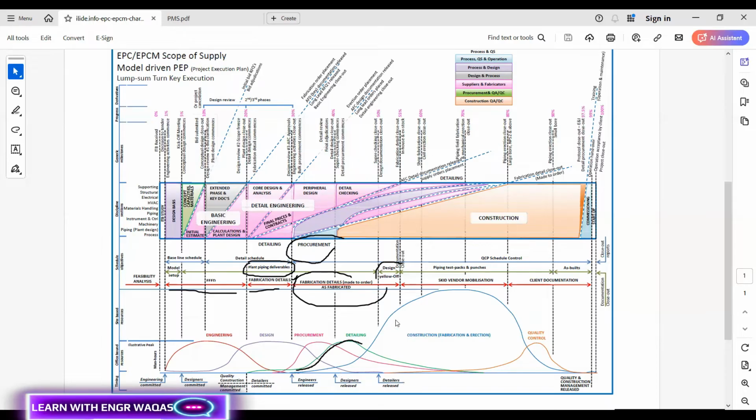And right after, I need manufacturing of skids, and I need more people on site. I need people in the office area too, but now site-based people are more in demand. As long as my site work is at its peak, my quality people, who conduct different kinds of tests, document reports and verify deliverables, are also in demand, but their demand comes at the end. So you can see how this curve is going.